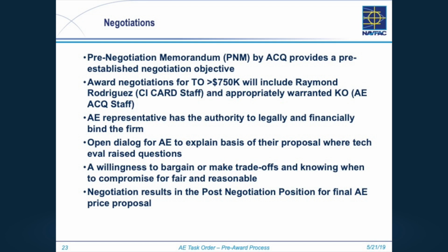And if they say, well, blah, blah, blah, and you accept it, then the acquisition person is going to be filling out that post-negotiation column right there and keeping notes. So, maybe they have a case for why it's more hours. And we say, okay, we agree. Or maybe we say, we'll compromise at 9. There's a lot of negotiating going on.